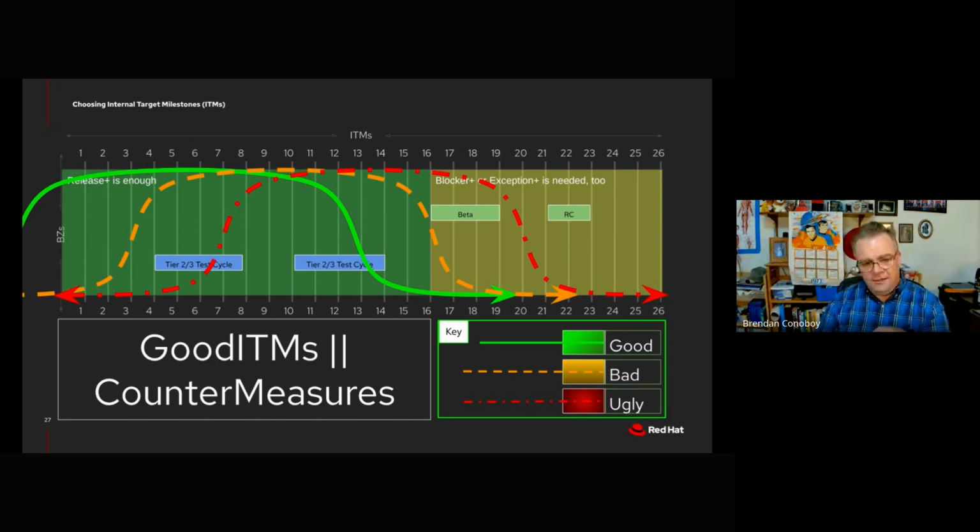It's also the case that because teams are doing Scrum, they're actually making decisions on a pretty cyclic basis. Like the maximum Scrum window is 4 weeks for teams, and most of them are doing 2-week sprints. And that means that if you're in week 9 and you put in a request, they're probably going to have evaluated it at least by week 11. That doesn't mean that they're going to say yes. In fact, what it actually means is that they'd be like, oh man, we've got all this stuff that we haven't finished yet, and now we've got this extra request from Neal. How do we prioritize this? Neal's thing is really awesome, but it's also kind of risky. They're probably going to want to push it into the next cycle. So the basic rule of the road here is that earlier is definitely better.